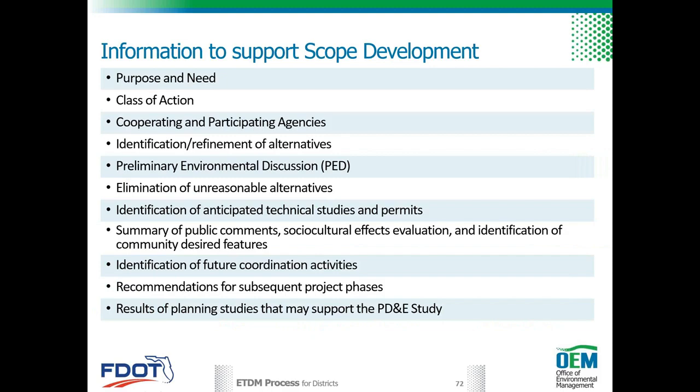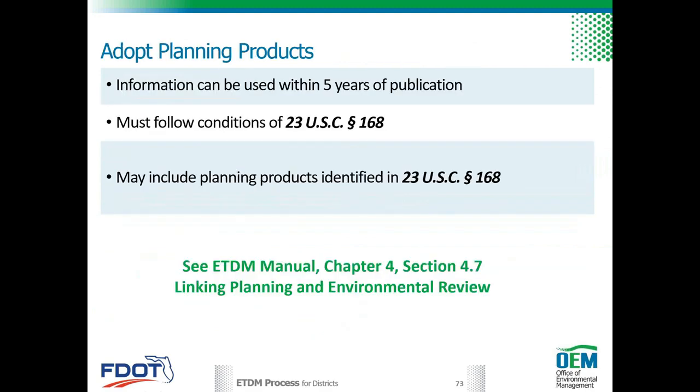We're looking at technical studies that we've learned from our screening event that we don't need to do. Identified future coordination activities, recommendations for subsequent project phases, and results of planning studies that may support the PD&E study. Information from the screening events can be used to support the PD&E study within 5 years of the publication date.